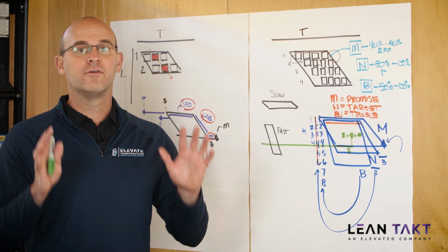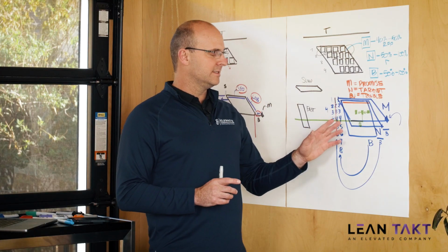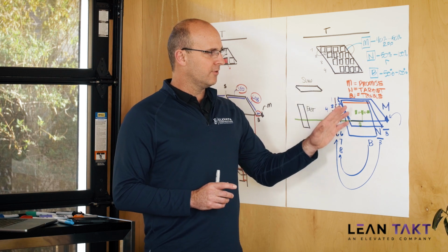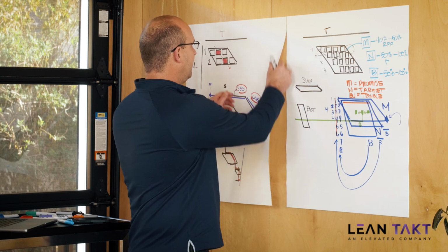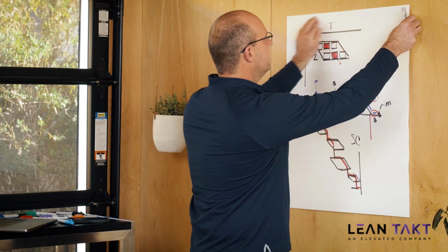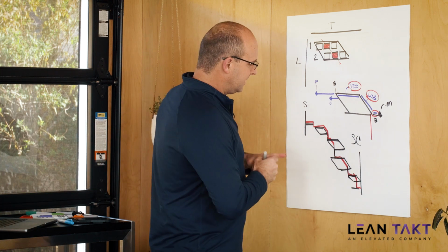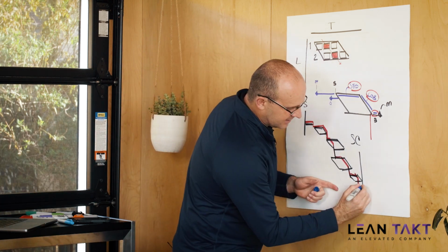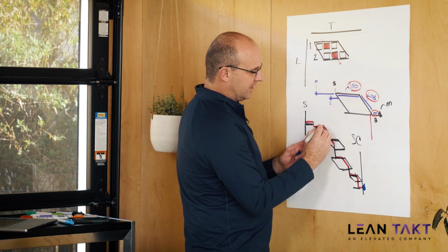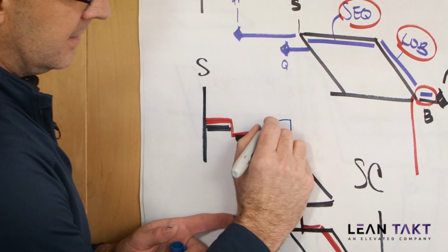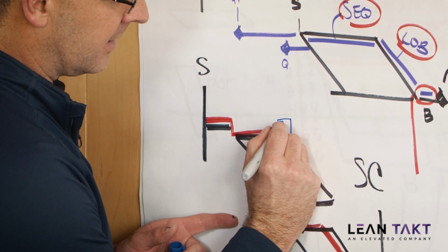It is all verifiable. So when you iterate on your takt plans and you are showing an overall strategy, this is what I want to see. Let me go ahead and move this back over. I want to see on every macro level takt plan, once you've promised, hey, this is the owner's end date, I want to see at each one of these phases a little table that says macro, norm, and BU for backup.